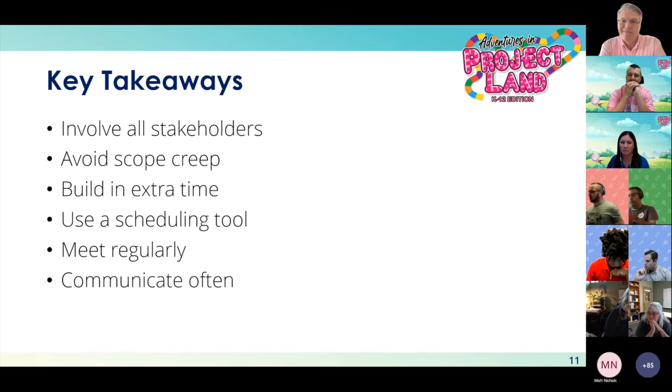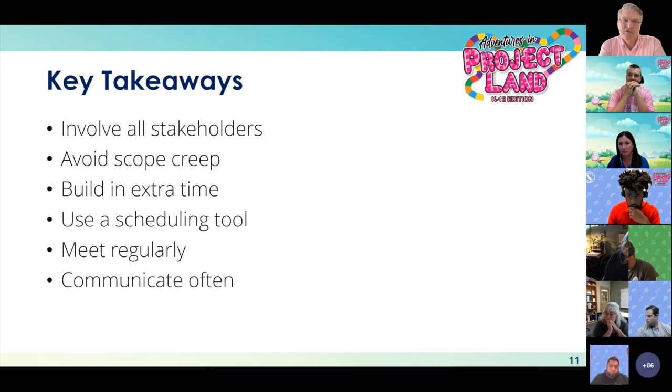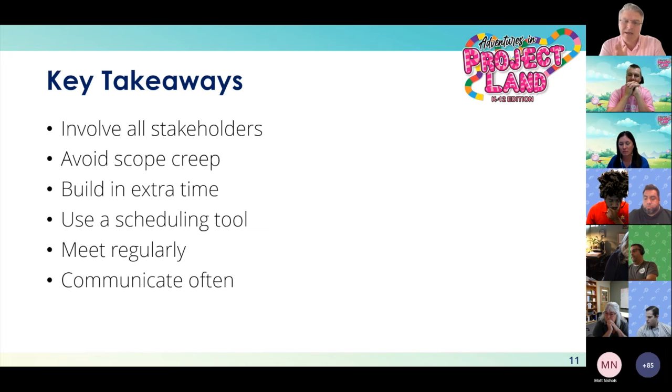And also just using some of the calendaring features to schedule out things that are reoccurring throughout the year or that happen every year, such as data submissions that we need to make to the state and federal level, being able to really schedule those out so we can get that at a glance picture of who's working on what when. That really helps us schedule times for other projects. If we can see that maybe our data specialist is knee deep in fall 1 CalPADS reporting in October through December, that might be a time that we really don't want to impact that person with a particular project that we're working on.